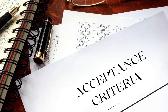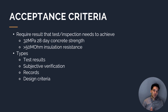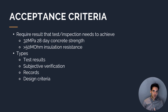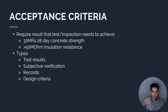Then we need to define our acceptance criteria — what standard does the testing have to meet? For example, for concrete testing, it might need to achieve a strength of 32 MPa within 28 days. For an insulation resistance test on an electrical cable, it might need to achieve greater than 50 megaohms. These could be test results, subjective verification by an expert, records like photos, or certain desirable criteria — it really depends on the specific check or test being done.